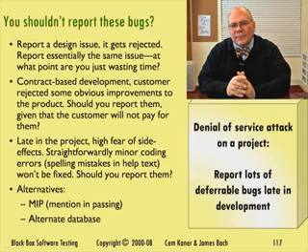One way to deal with late bugs is called mentioning them in passing. The tester reports the bug informally. Oh, by the way, we saw this. Is anybody interested? The idea is that this gets the bug noticed at least a little bit, but there's no overhead if the decision is not to fix it.